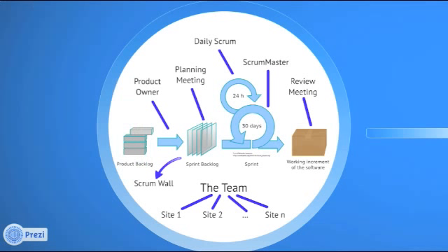Scrum divides the project manager role into two different roles. So there's the product owner role, and the product owner is responsible for making sure the project does the right stuff. So making sure we're building the right system. The product owner is kind of like a chief requirements analyst. They're in charge of liaising with the client, and they act as a boundary spanner between the team and the client. The Scrum Master is responsible for running the process.